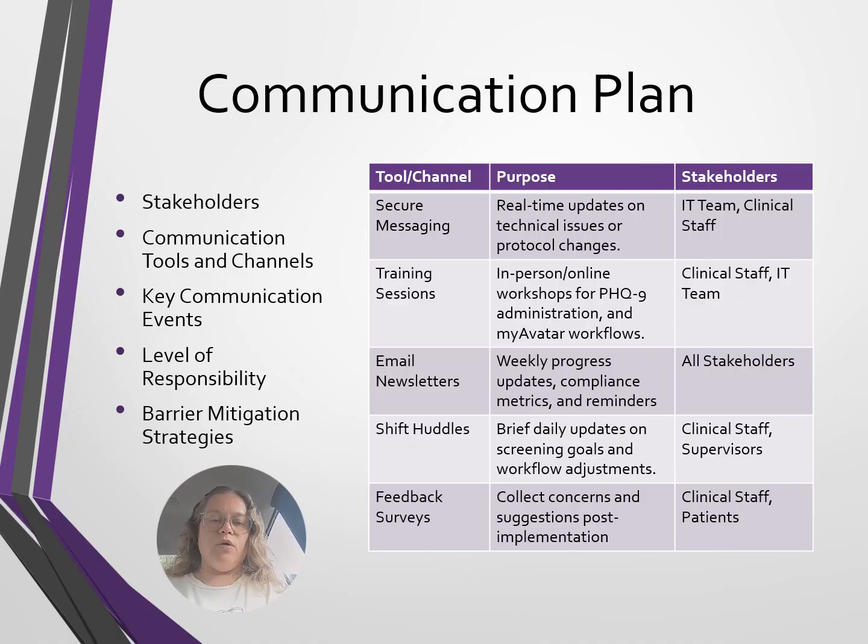Key communication events include the pre-implementation phase, which includes a kickoff meeting to announce project goals, timelines, and roles, as well as an EMR demo session to showcase the PHQ integration for clinical and IT teams in My Avatar. The second event is the implementation phase. This involves weekly check-ins to address technical challenges and share screening compliance rates. It also includes incentive announcements to recognize high-performing staff. Third, there's a post-implementation phase, which includes review webinars to analyze outcomes, share patient feedback, and refine workflows.